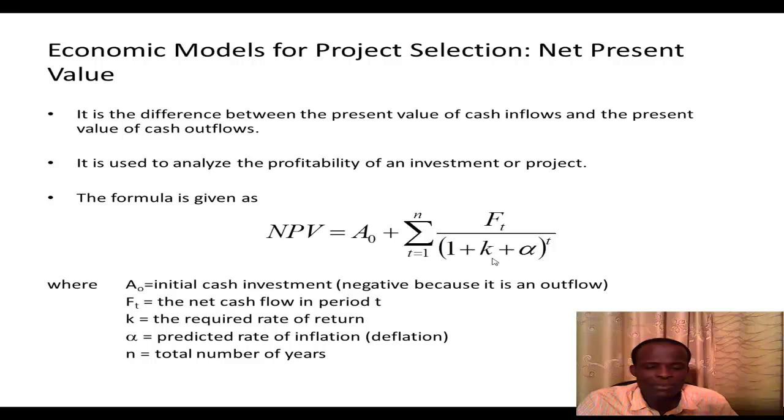So what the net present value does is it sums up all the present values, and then adds it to the initial investment.